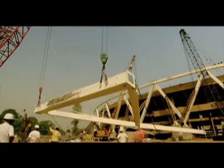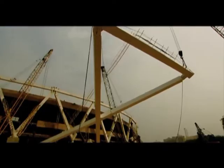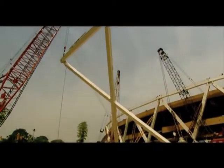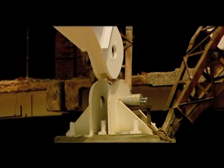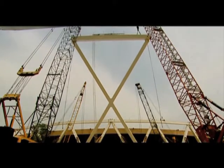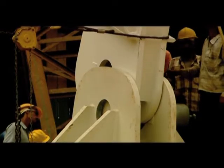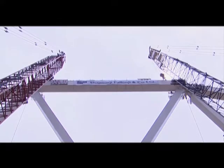The lifting of the 44 120-ton X columns was a feat. When the project was bid for, the thought was to lift the column in parts and pieces. When the actual lift took place, it was done in one piece. Prior to the lift, a dry run on the ground was done, where all the parts were secured and the central piece successfully lifted.